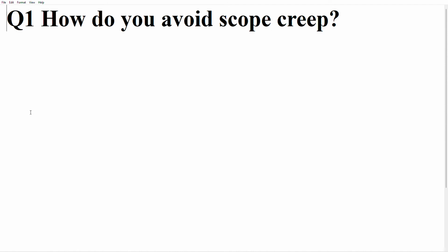Once you have that working agreement, you mention in it, if there is any scope creep, it has to be taken into consideration. It shouldn't happen over and over, and so on and so forth. If you want to discuss anything with the team, you come through me. You don't go directly to the team members. Don't put them off work and all that. Those kinds of things you can discuss in your working agreement.